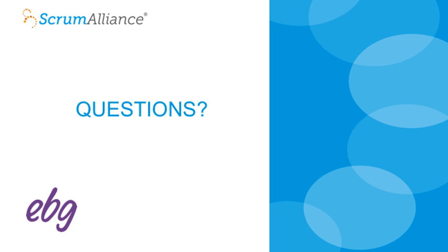And then you can add an experiment. I mean, think about Kaizen, improvement. The team may say, we want to improve our ability to get to Done, and we'll do an experiment for the next sprint where we're going to use Ready. So let's actually make that a story, because improvement is extremely valuable. It'll pay for itself in a couple of sprints. So that might be one approach that you could try.